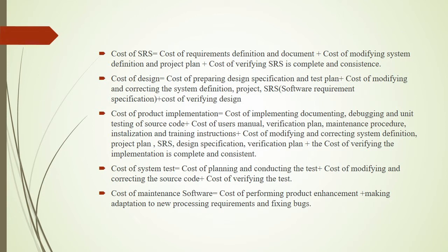Next, cost of product implementation is equal to cost of implementing, documenting, debugging and unit testing of source code plus cost of user's manual, verification plan, maintenance procedure, installation and training instructions plus cost of modifying and correcting system definition, project plan, SRS, design specification, verification plan plus the cost of verifying the implementation is complete and consistent.